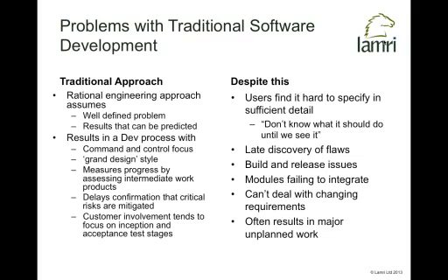Despite this solid, sensible engineering approach, we still live in a world where our users find it immensely hard to specify in the detail that we're asking them to specify. There's this terrible syndrome of we don't know what the thing should do until we see it doing some of it. We often don't discover issues until right at the 11th hour, because it's when they're codified in software that we go, oh gosh, that doesn't work now, that doesn't integrate, that doesn't build. We often get build and release issues. We often get stuff that fails to plumb together as we thought it would, because we just missed the detail, really. And we've got an approach here that is quite resistant to changing requirements.